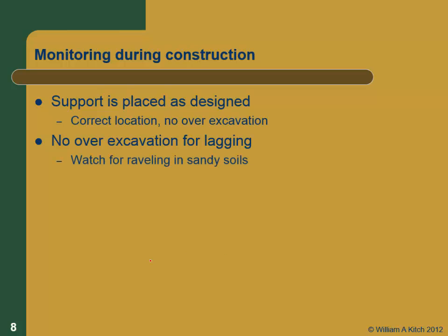Sometimes this takes hand excavation to do the lagging excavation right, and people really don't like that. And then if you have soils that have poor stand-up time, if you've got sandy soils, you really need to watch for raveling. And if they're not getting it done fast enough to prevent raveling, then you need to stop the job and come up with another solution, because that's a good way to lose an excavation.